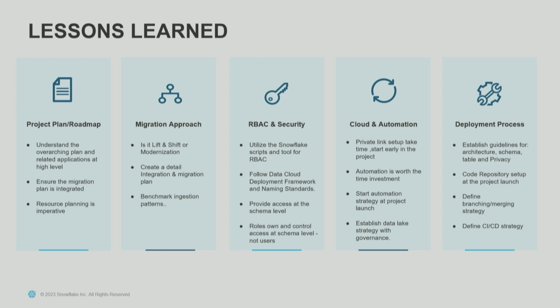Going into cloud automation, PrivateLink requires a lot of time to set up, and we recommend customers set up the PrivateLink early in the project. Also, make sure you have an automation strategy. One of my customers decided to move from a single account to multiple accounts, and they did not invest time in automation.